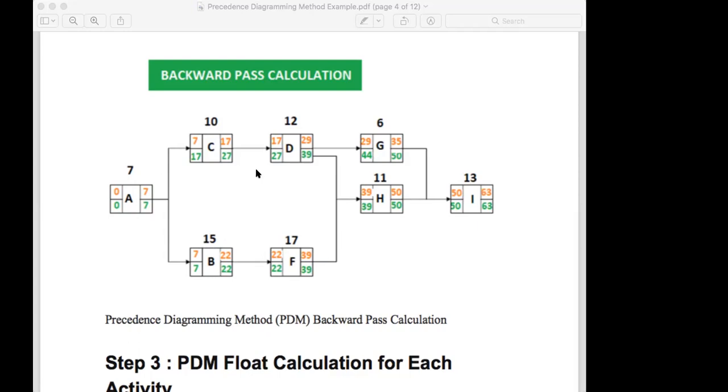This way, nothing. So let's look at the other side. Here you get 50. Then you put 50 here, because to start at 50, you finish it at 50. Soon after finishing, you start at 50. So you put 50 here. Now the duration is 6, reduce that, you can start it at 44. Without here, you can understand what I am explaining.